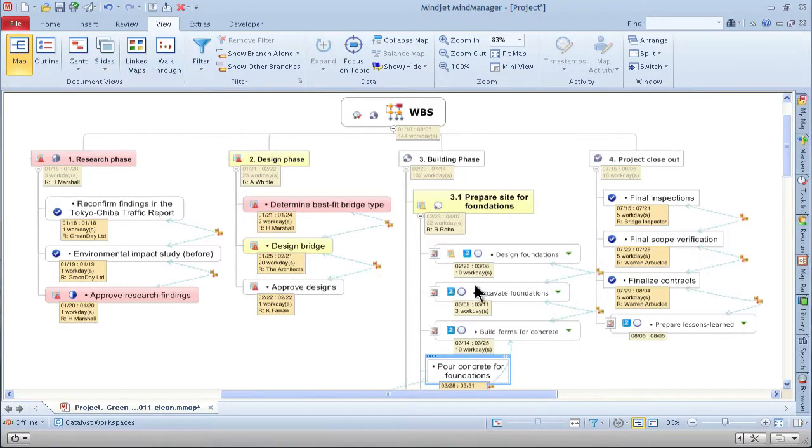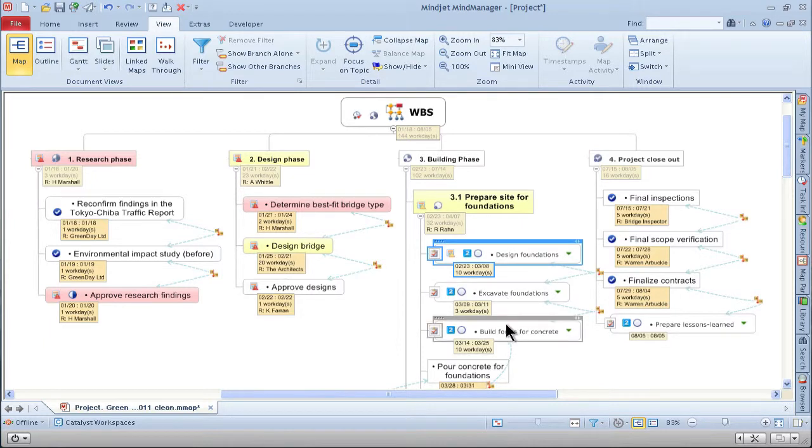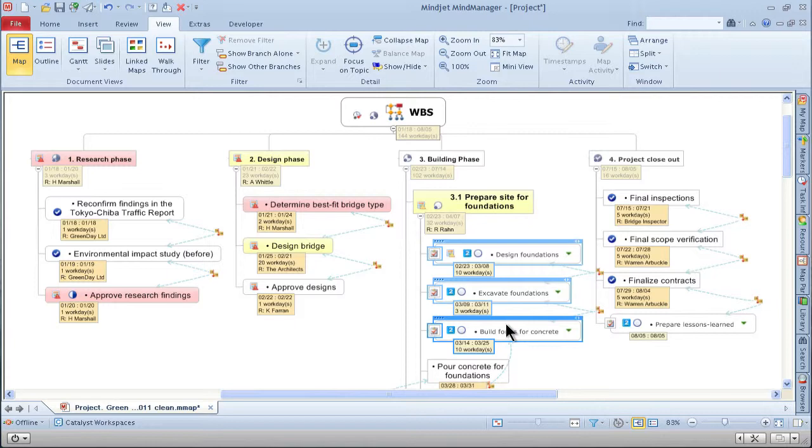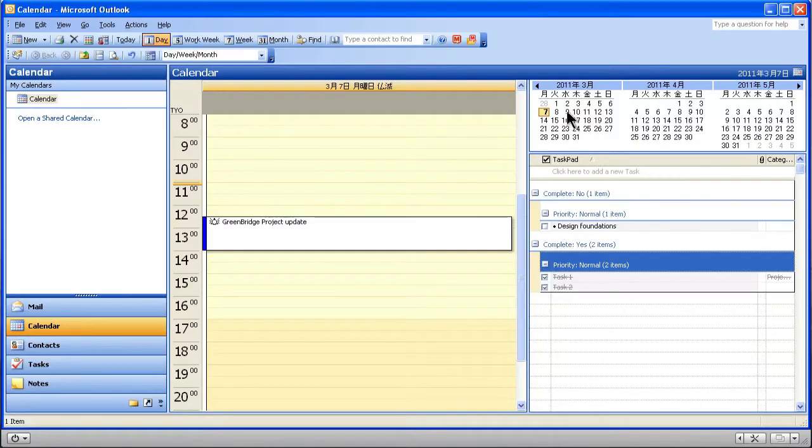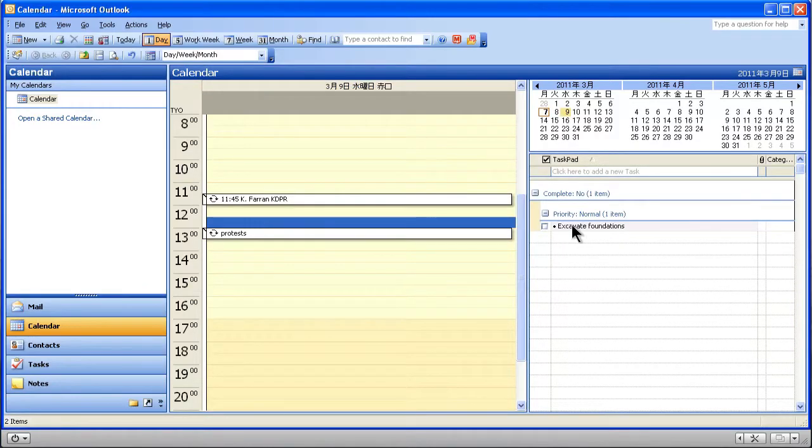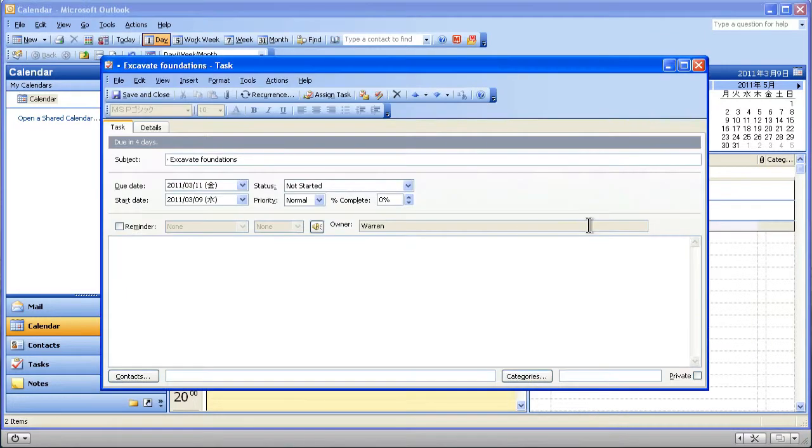The most exciting integration is with Outlook. You can send, then assign tasks within Outlook all from the project dashboard. And the best part is that you can automatically monitor tasks and sync finished tasks back to your project dashboard.